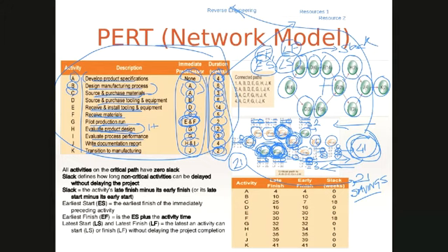That makes sense too, because you need all activities done before you can start the next one. And when you're backward propagating, you're saying in order to keep everything tight in schedule and create the right slack, you want to figure out the lowest latest start between two activities so that you can prepare that so they can start right after you've completed it.